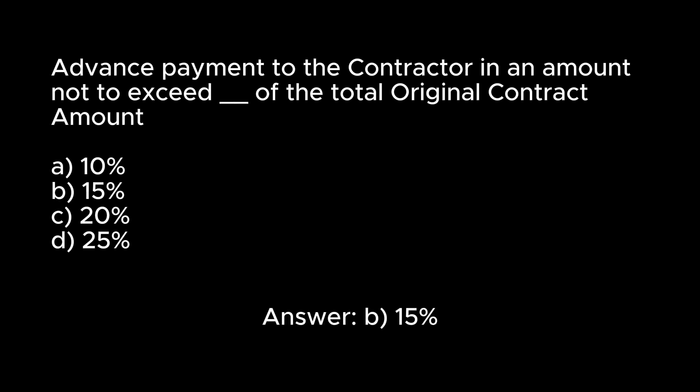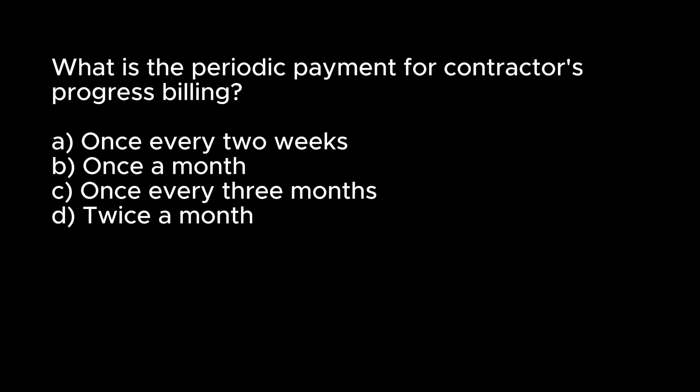What is the periodic payment for contractor's progress billing? A. Once every two weeks. B. Once a month. C. Once every three months. D. Twice a month. Answer: B. Once a month.